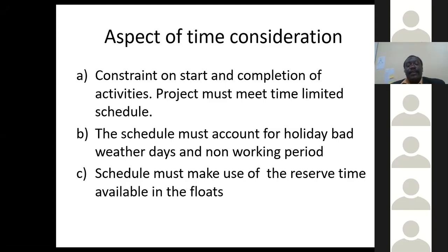Even if there's bad weather, you need to plan for bad weather, because we have some tools that can be used to predict the annual rainfall. The annual bad weather can be predicted unless it is something out of control. Right now, you know by December what will be happening. You actually know when the rain season starts.